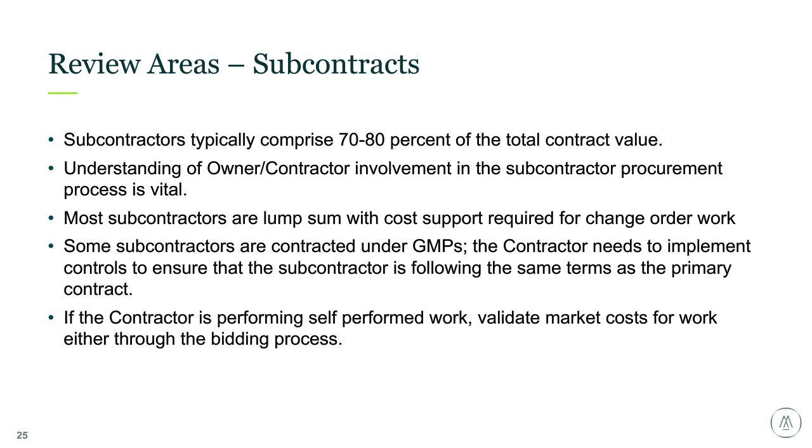Most subcontractors are lump sum that require cost support for change orders. So the key here is when you get the change orders, really ask for detail. Get the itemized cost support and make sure that you're not paying for anything more than you need to be.